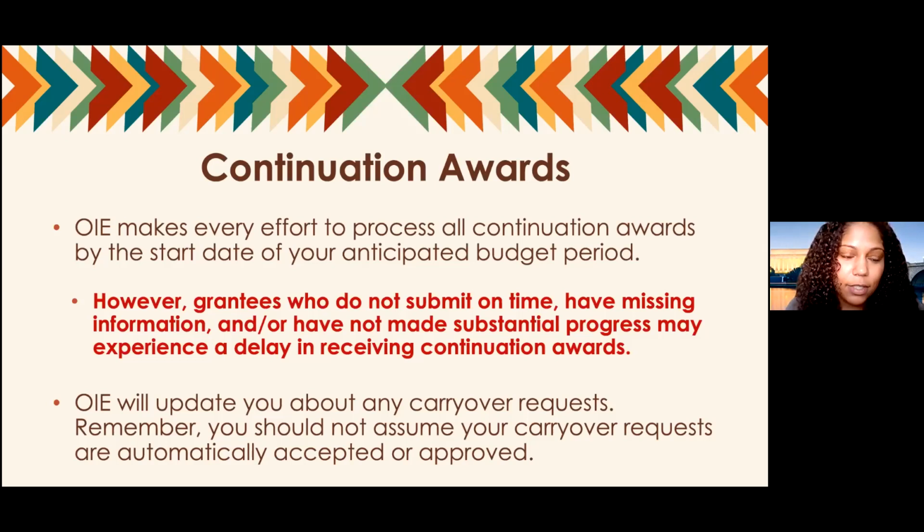So the last bullet, that's very important: carryovers are not guaranteed. So, please be persuasive in them. Also, please know what to carry over. You don't want to say you're carrying over things, but then providing the exact same thing in year two that was already planned in year two. There should be an increase in things. There should be more things added. Please explain how that carryover will be used. Don't just say we didn't hire people, so we're going to carry over our personnel funds.